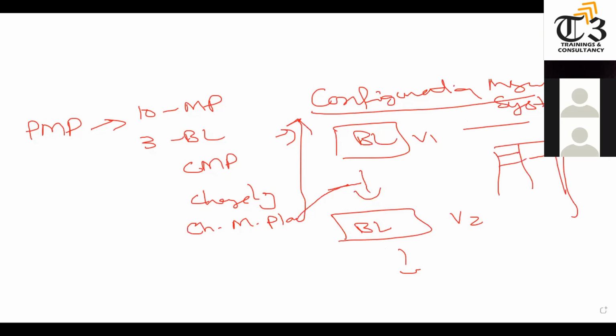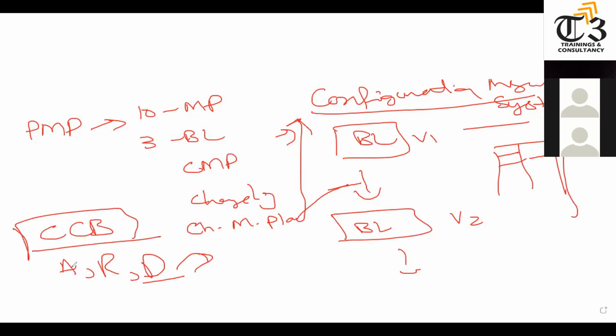In the change log, we have the change request status: whether accepted, rejected, or deferred. Deferred means the change is postponed, and we will recall it after 1 month. It's not the time to implement the change; we'll do it later. Who will decide? The change control board. So accept, reject, or defer. In the change log, we will write accepted, rejected, or deferred.